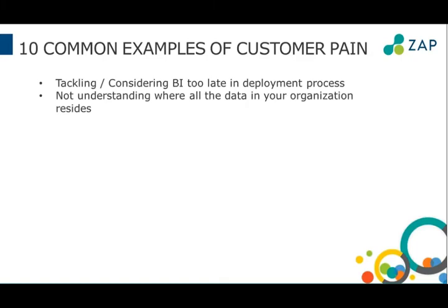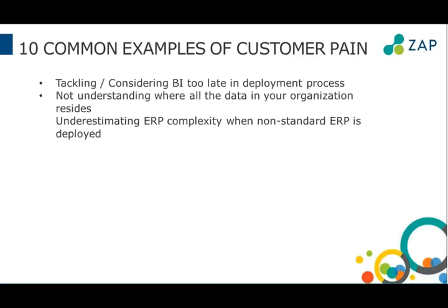The other pain is coming to market and not really understanding where all your data is. You know, we've got an organisation at the moment, as I said, that has got CRM. They're going to have 18 or 19 other data sources. We have organisations that have just deployed AX, and it's going to be fantastic for them, but they've got 20 years of JD Edwards data that without that, it's of little use to them, so BI becomes useless. So just make sure that as you go into this, you understand where all your data is, because at a C-level, if you're going to deliver BI out to the business and make it pervasive, you've got to make sure that marketing's taken care of, finance is taken care of, production's taken care of, and there'll be little fiefdoms of data that may not even be known to the business that you have to clean up and get into a data source that allows you to actually run the business properly.